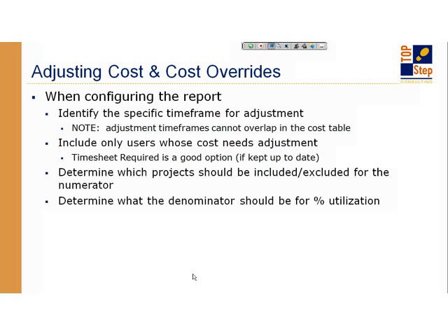So if I take a holiday, I take 1 day of vacation, then I work 3 10-hour days. Using an 8-hour day, that is 8 and 30, 46 hours in a week. But I actually only work 30 hours in that week. So is it 46 hours that you're using or 30 hours that you're using for cost adjustment? It's something to think about because really the only overtime that was done was the 6 hours, except you had a company holiday that week. So there's usually a bigger discussion as to what contributes to that user's percentage that would impact the cost adjustment.